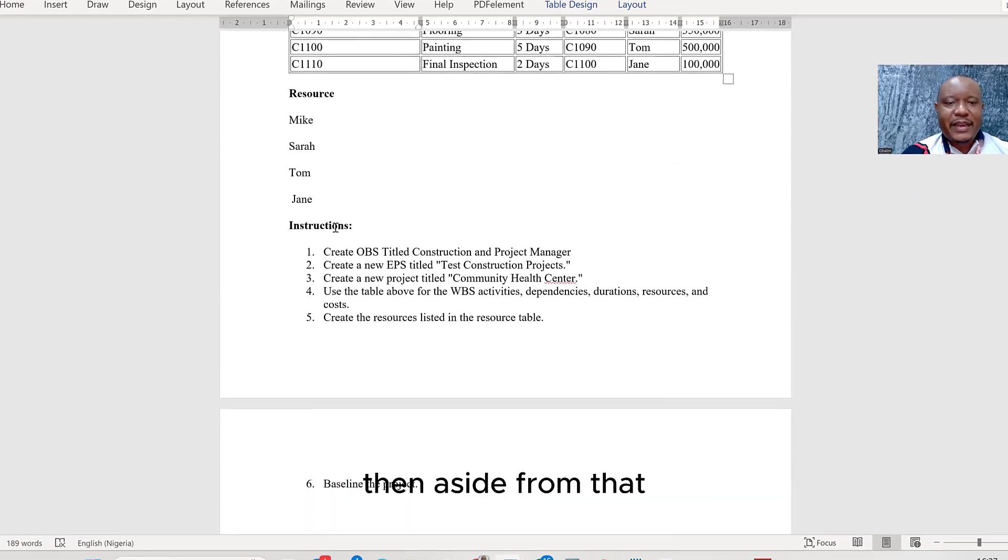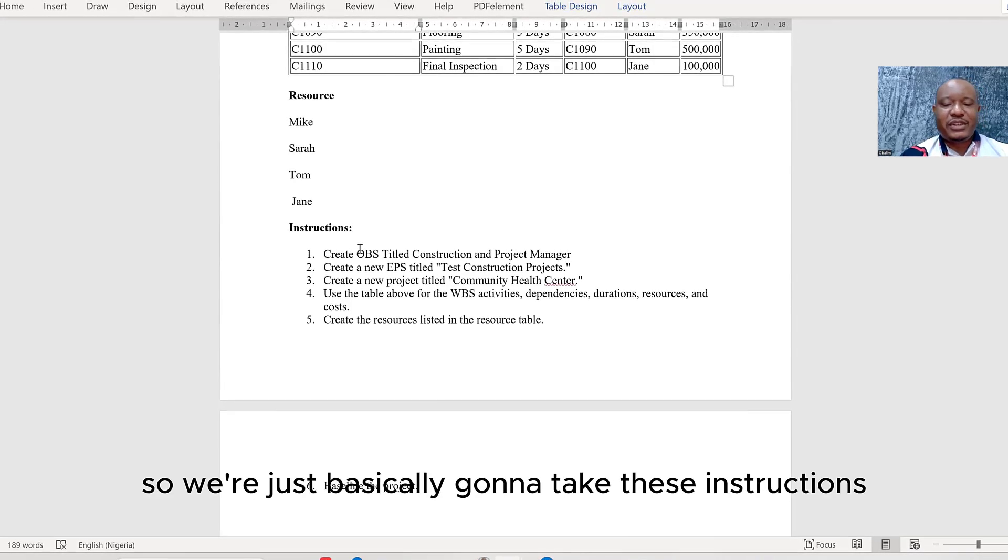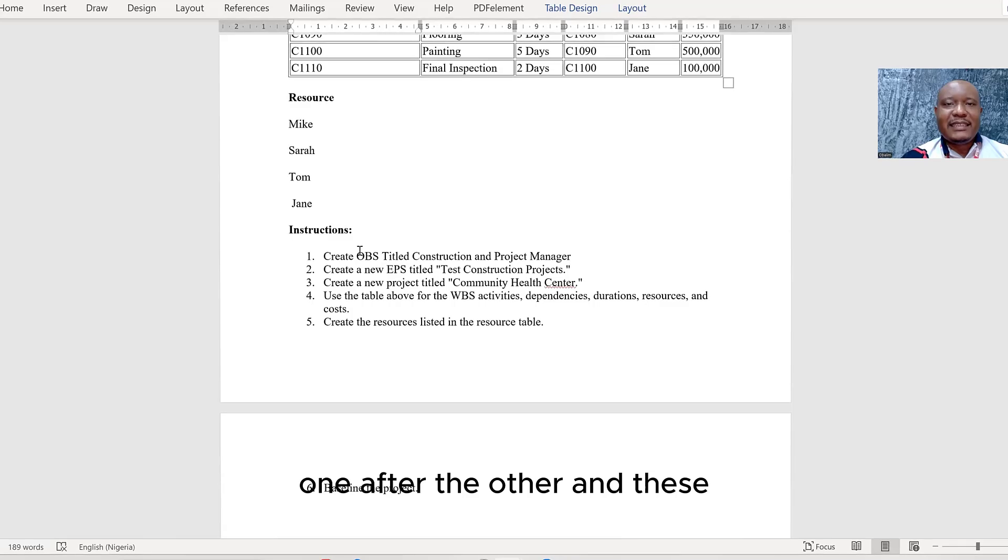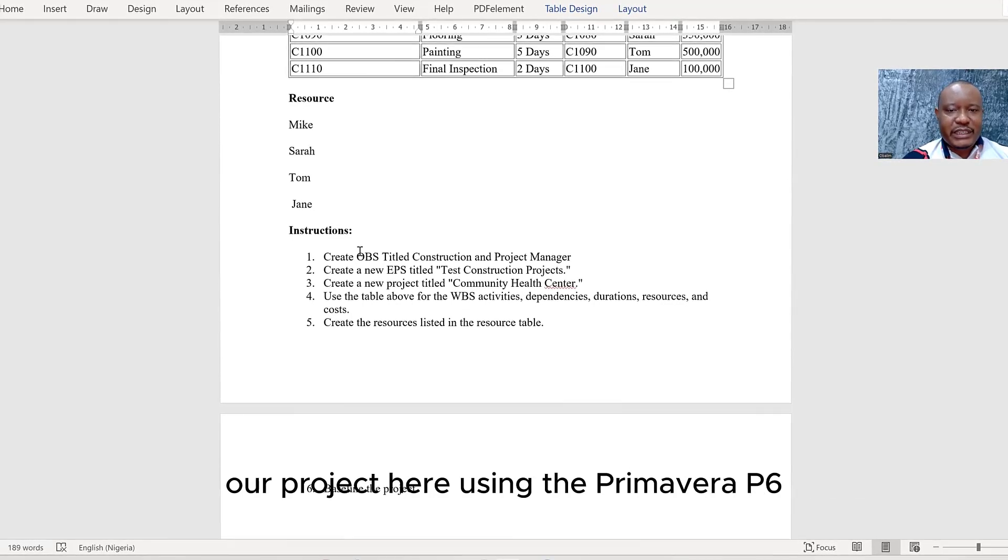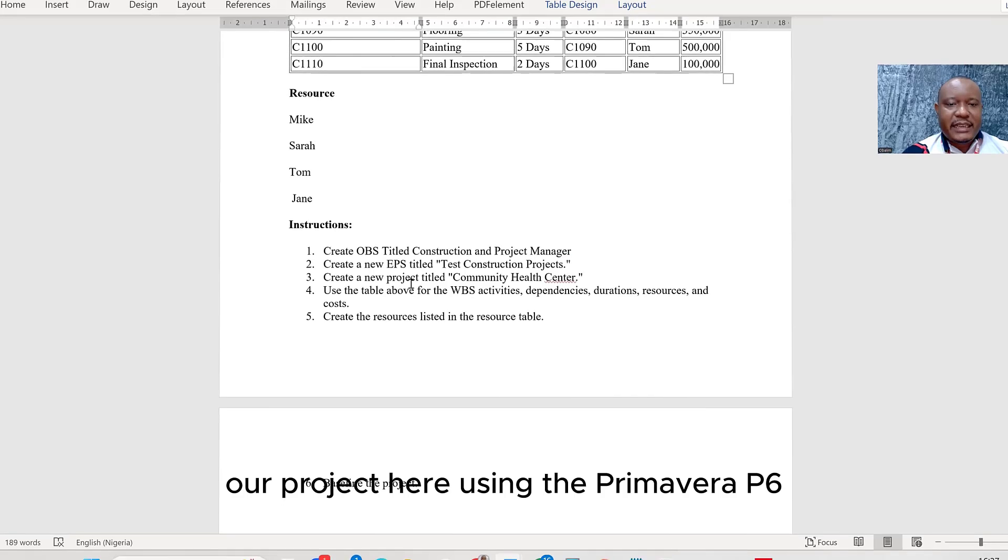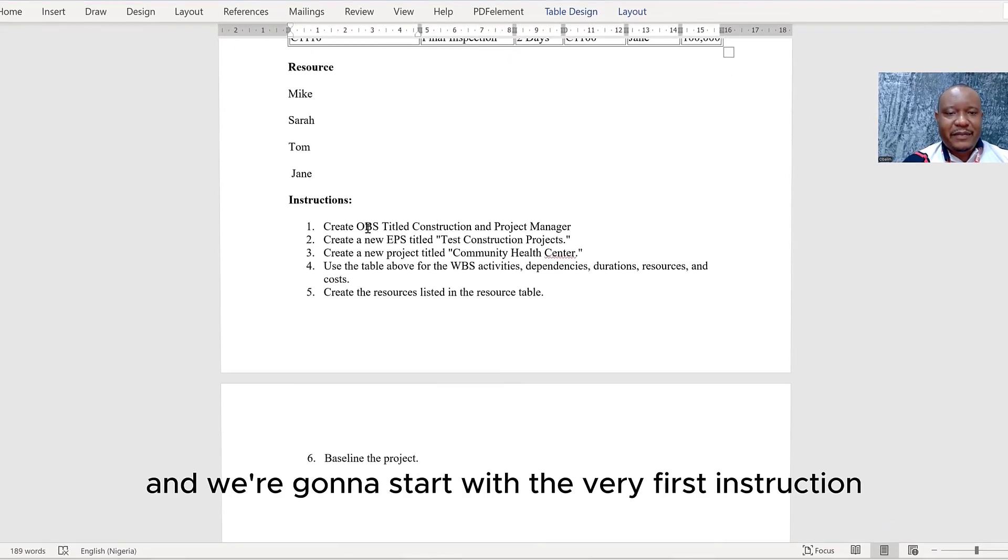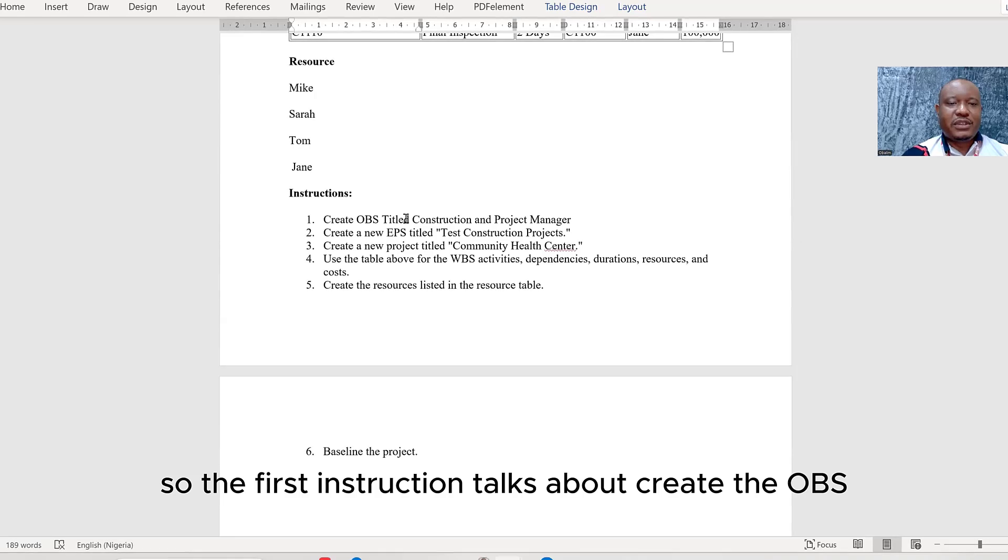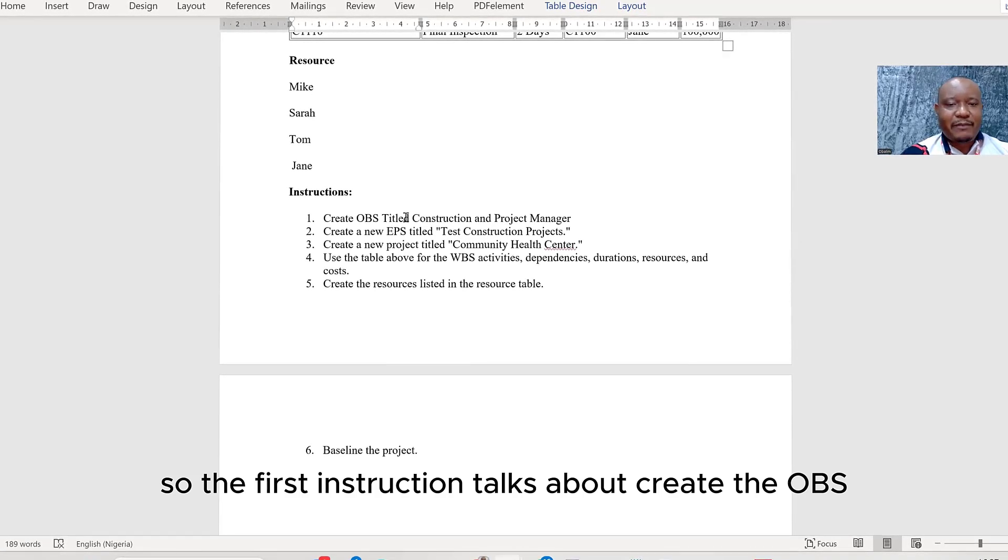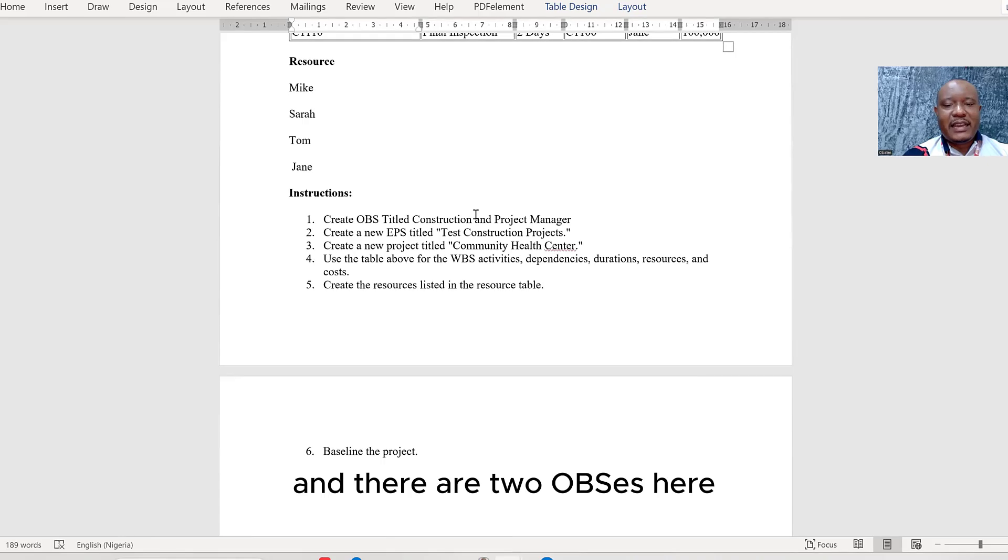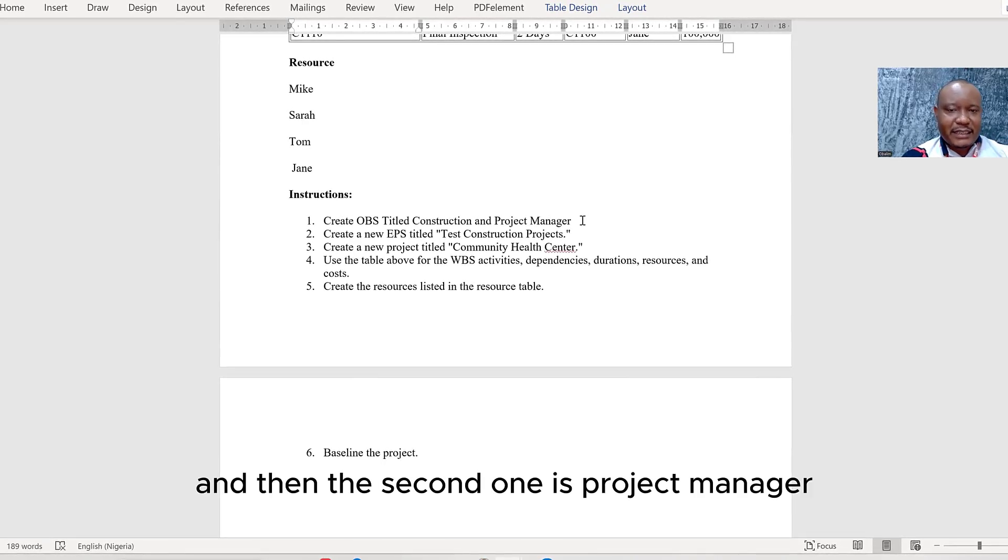Then aside from that, we're also going to see the instructions. We're just basically going to take these instructions one after the other. These are the steps that we're going to be following to create our project here using Primavera P6. We're going to start with the very first instruction. So the first instruction talks about create the OBS. There are two OBSs here: one is construction, and then the second one is project manager.